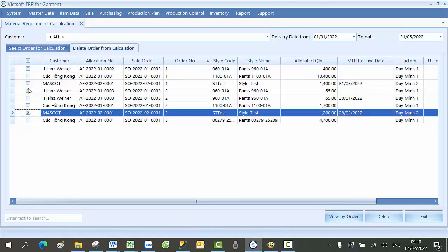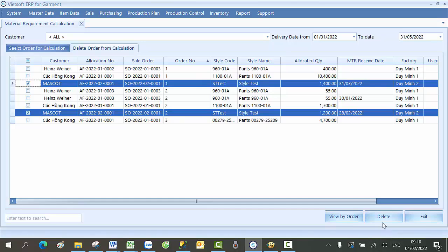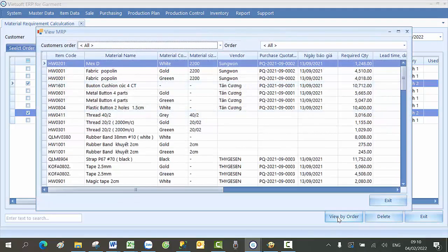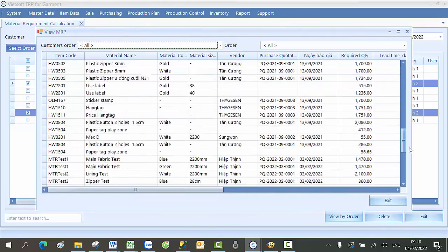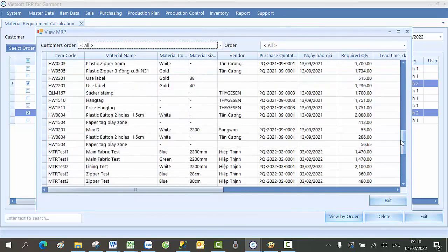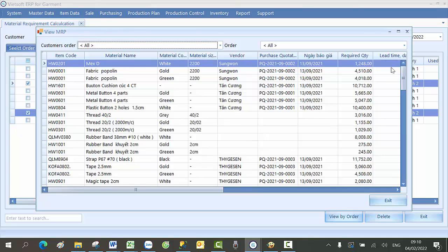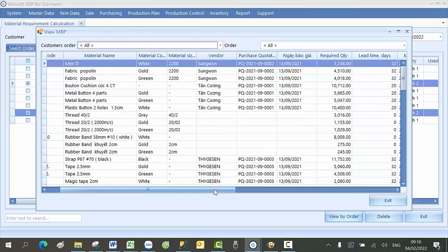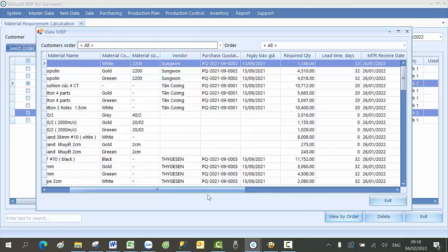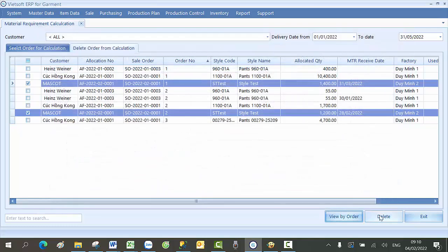But you remember that you can delete materials of orders when you haven't placed any material of this order. If you already placed one material for this order, you cannot delete from the list anymore. Then, you need to treat adjustment you want manually in the purchasing order step.